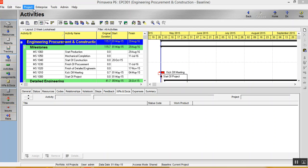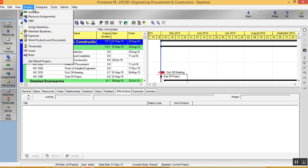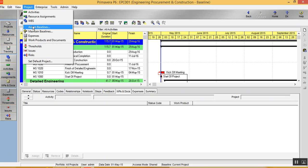I'll just tell you the method how baseline can be set. You have to maintain a baseline from here and then assign a baseline. So this is the first step which is required before you proceed for S-Curve. So when you maintain your baseline and you assign your baseline, it implies that your plan has been now finalized.